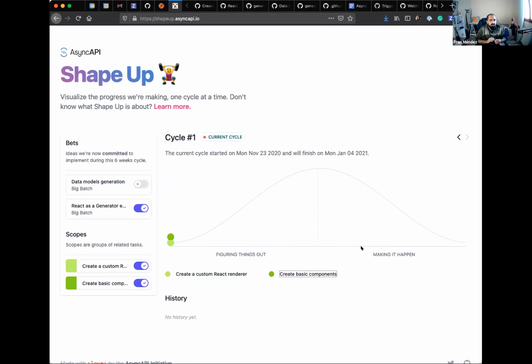Sure. So one thing, Lucas will keep working on them from time to time, fixing some bugs and small issues and all this stuff. And after this 6-week cycle, we have 2 weeks where people can work on whatever they want. We'll pick these small issues, bugs, small features, and use these 2 weeks to keep progressing there.